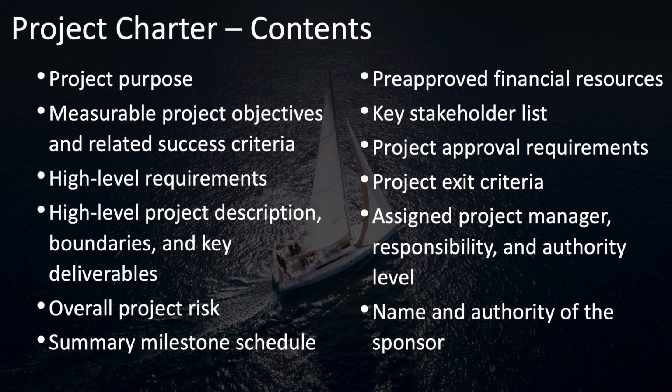The project exit criteria should be included, and this spells out what the conditions are that need to be met in order to close or cancel the project or any phase of the project. The project charter will also have an assignment of a project manager and outline the project manager's responsibility and level of authority. It will also, of course, specifically name the sponsor and the authority of the sponsor.